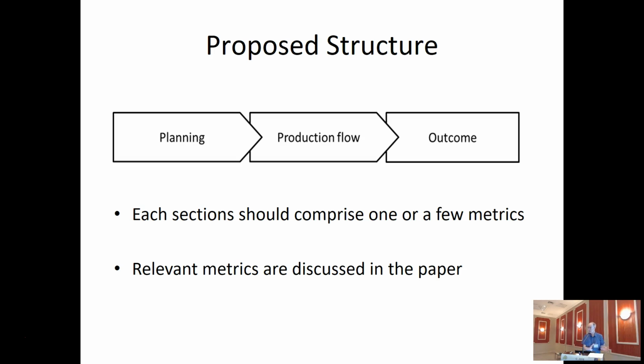It's the throughput and it's the smoothness of the process. If you have a smooth-going flow, but almost no throughput at all, nothing is coming out of it, but it's smooth and even like this, you won't call it good flow. You just won't do it. And on the other hand, if you have a process with a huge throughput, but it stops and goes and has no smoothness, you won't call it good flow either. So good flow, as we see it, is a combination of throughput and smoothness.